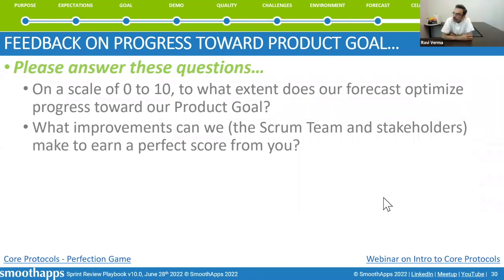So when Nagesh and I did this for a company, it was a multi-billion-dollar publicly traded company. We felt that the most important attendees were the C-suite. So we used to go to the C-suite and ask them, what is a 90-minute window that you can give to us every 2 weeks, which will conflict the least with all your road shows, talking to investors and so on. And then we put some guardrails.